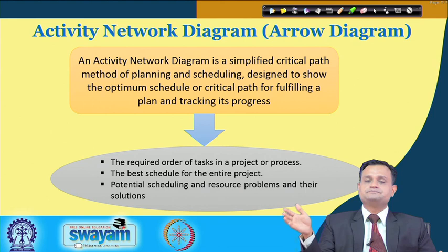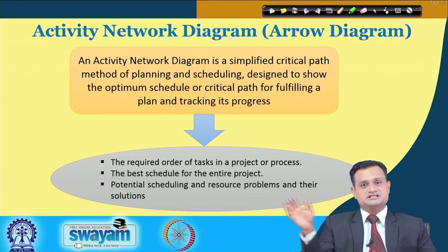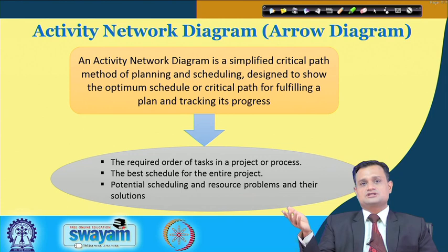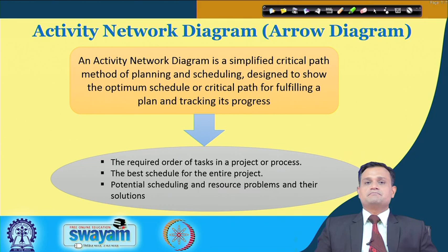So my critical path will decide the project completion time, and we go for critical path analysis because we want to apply selective control in managing the project. So here again the Pareto law applies. I cannot monitor and control all the activities equally, but if there are 1000 activities in the project and suppose my critical path contains 100 activities, then I would be able to apply better control over these 100 activities, which have a direct impact on the project completion time.